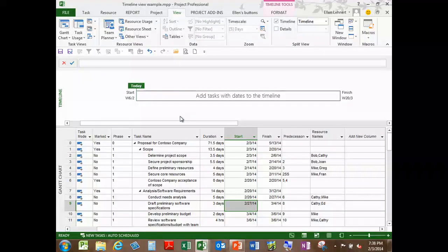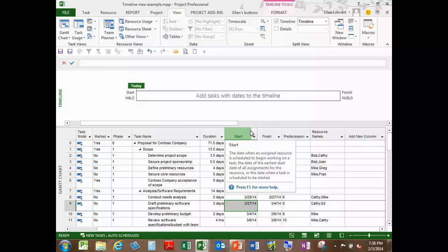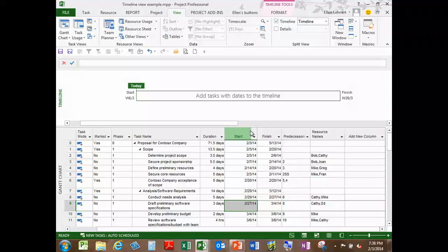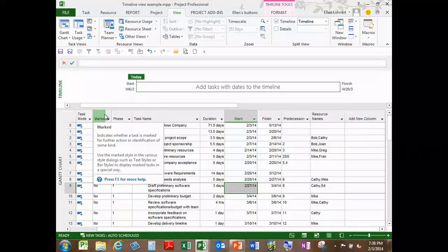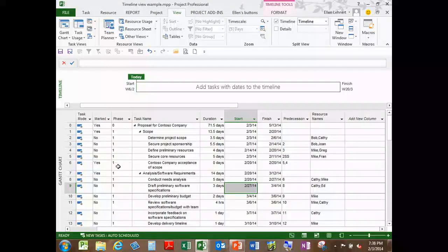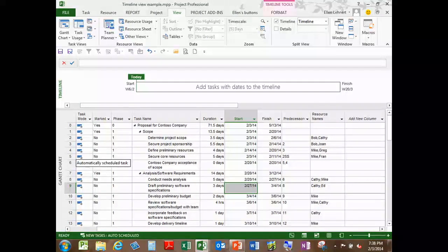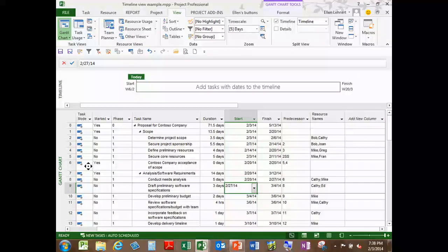All right? So everybody in every one of their projects always has key tasks or milestones that are usually very important for reporting. Now, what you might not be aware of is there's a column called Marked. I like to use this. You can use a flag field just the same way. And I encourage people to go down and mark every one of those that are your key tasks, key milestones, anything that you need for that regular status reporting.